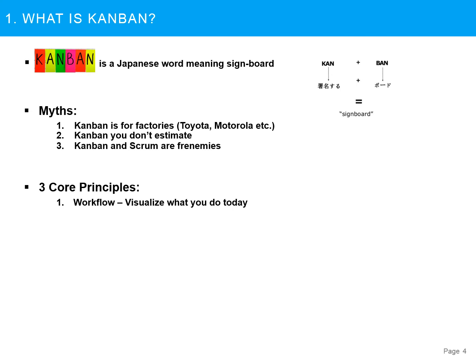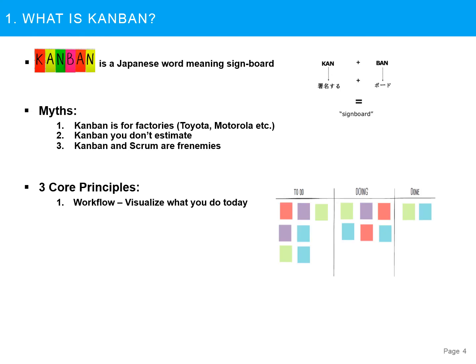So in the most basic form, a Kanban board has just a few columns, such as to do, in progress, and completed. So anything you do, you follow these steps. You have stuff to do, you have stuff that you are doing, and you have stuff you have done. When adopted to software development, as you can see in this example, a Kanban system usually starts with a board and a visual card that represents items on your product backlog.